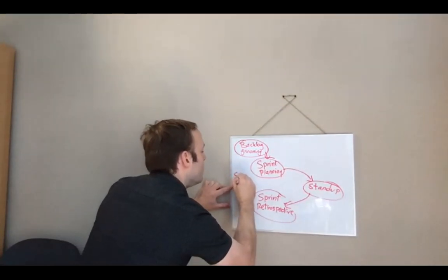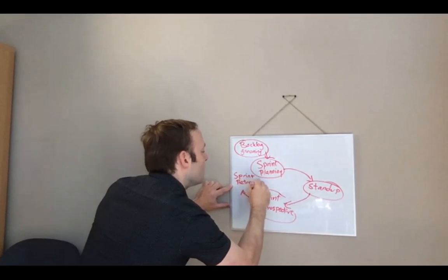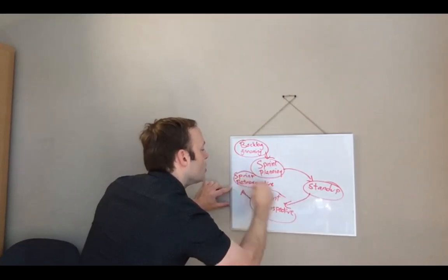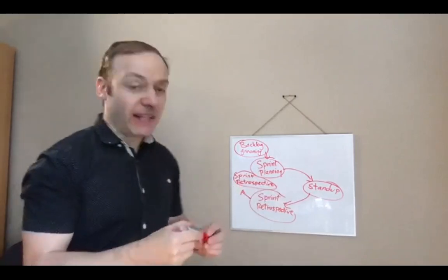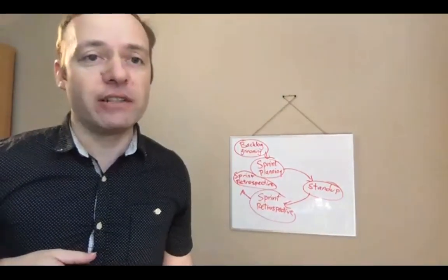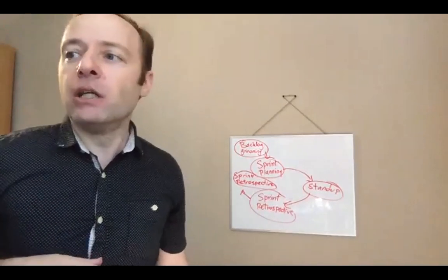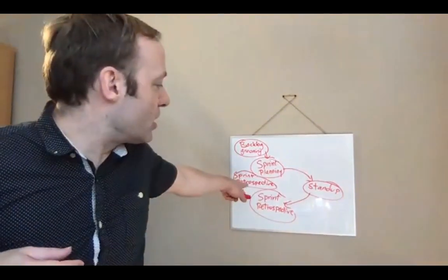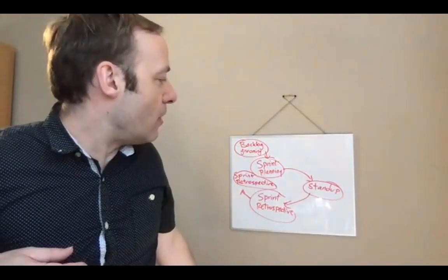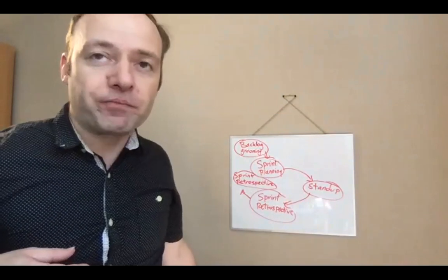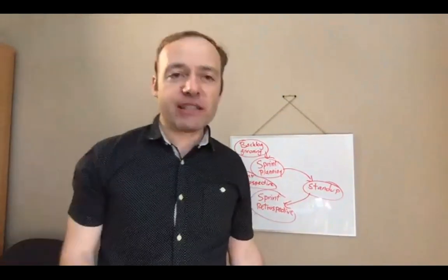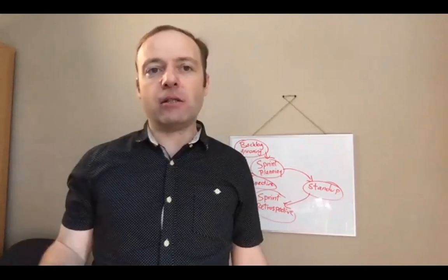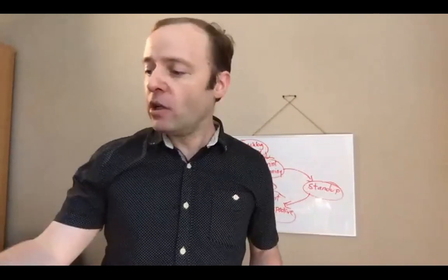And then the sprint retrospective, that's an introspective meeting in which we identify something we could make better in our sprint, in our methodology. Maybe you want to reduce the amount of work in progress or something. The team will come up with some ideas of things you could improve, and you guys will decide on a thing, and then maybe you can create a backlog item for that improvement and assign it to someone for following up.